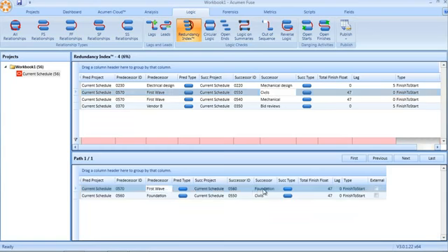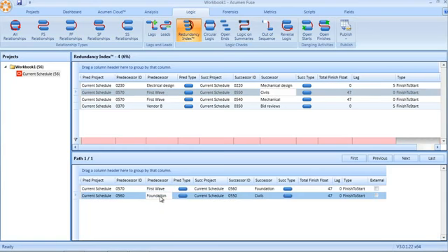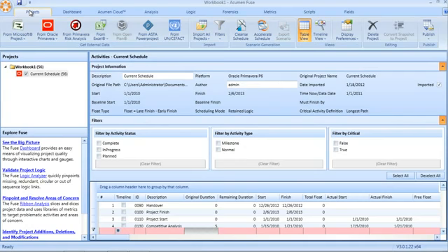First wave is actually going to foundation. Foundation in turn is then driving civils. Because of this driving logic identified in this bottom table, this redundant link, this first wave to civils link, can actually be removed from our schedule. Talking of removing the redundancy, Fuse also provides a really easy means of cleansing the schedule and removing the redundancy.